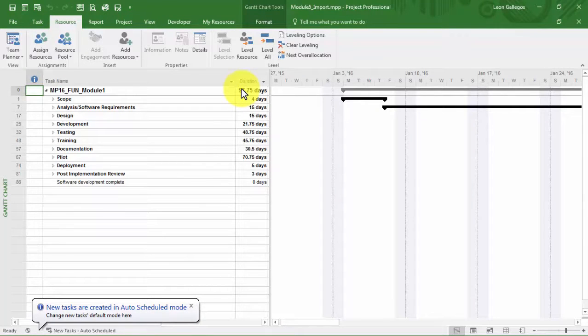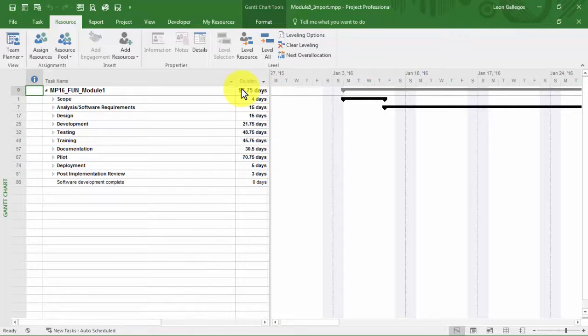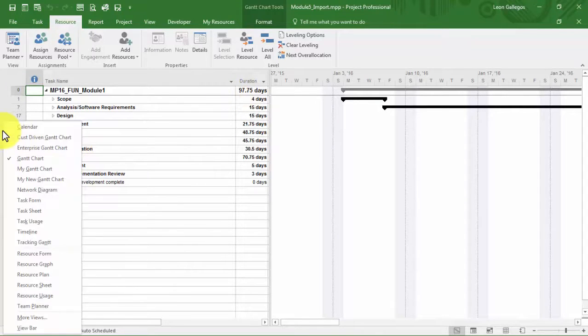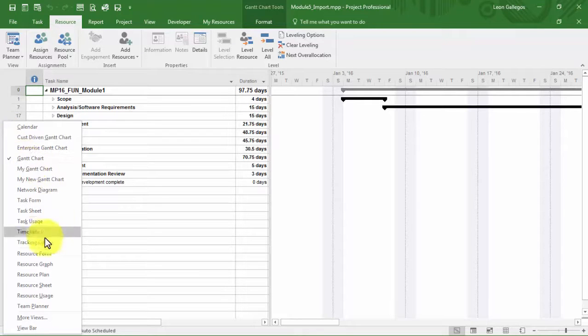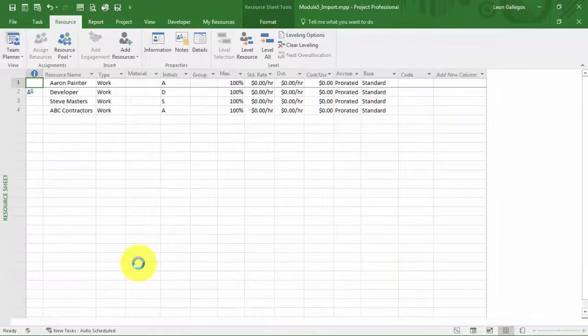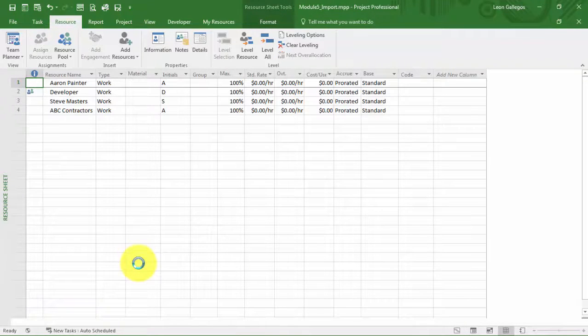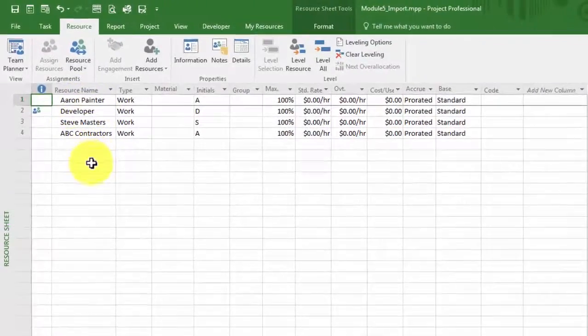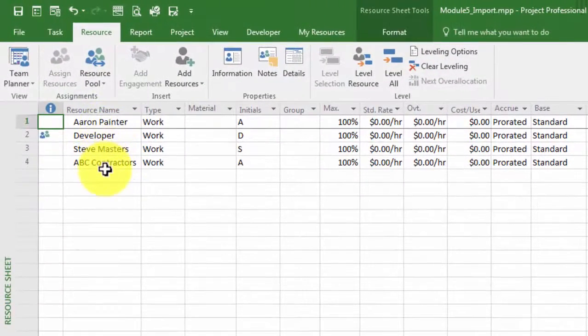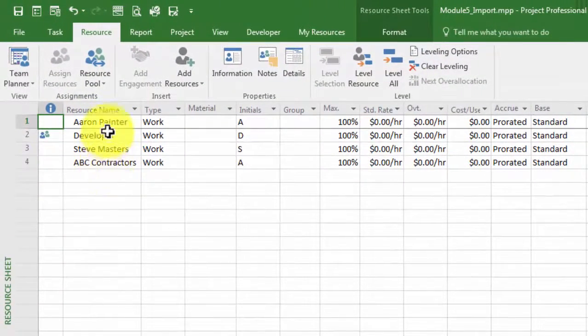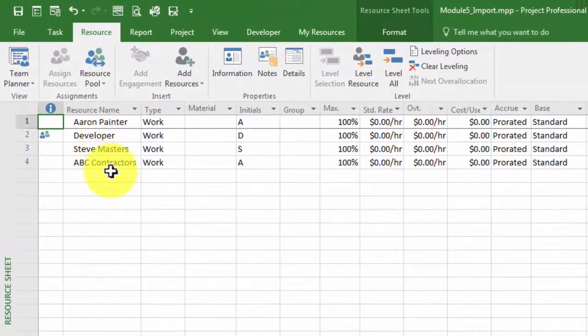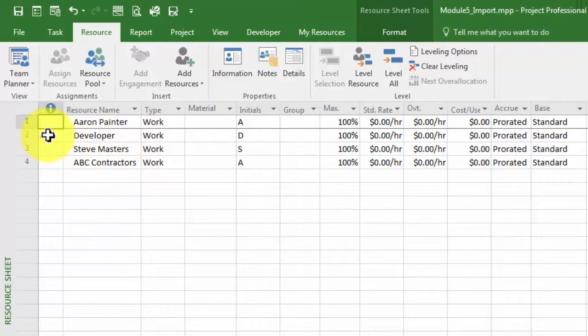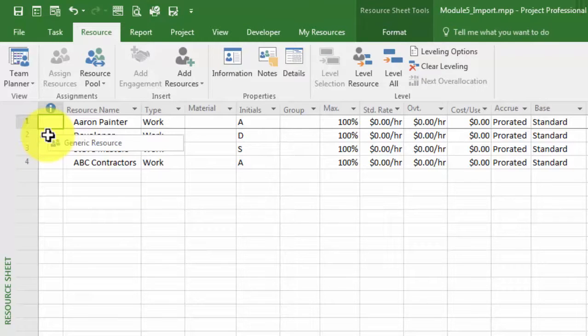The first thing I want you to be aware of is the resources that are in this particular project. I'm going to right-click my view bar area and navigate down into the resource sheet. What you'll notice within the resource sheet are some existing resources. One of those resources, Developer, has the icon next to it that's an indication that it's a generic resource. Generic resources transcend the notion of PWA and they go into even the client side, so you can always create these generics.